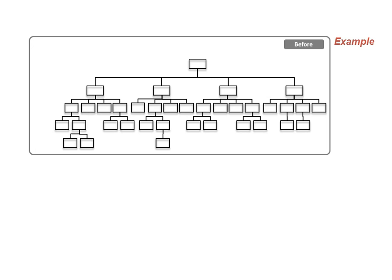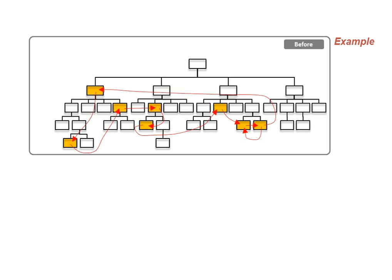Consider a project organized functionally with four main themes, such as engineering, procurement, fabrication, and commissioning. If you look more closely at who is involved in a particular work process in this project, say planning, you may find that there are seven or eight people across three teams and that there is quite a lot of interaction between them. They need to exchange information and coordinate with each other to get the job done. And this is an indication that they are interdependent.